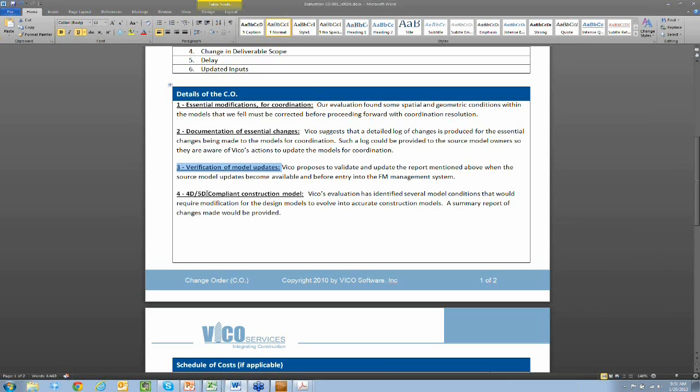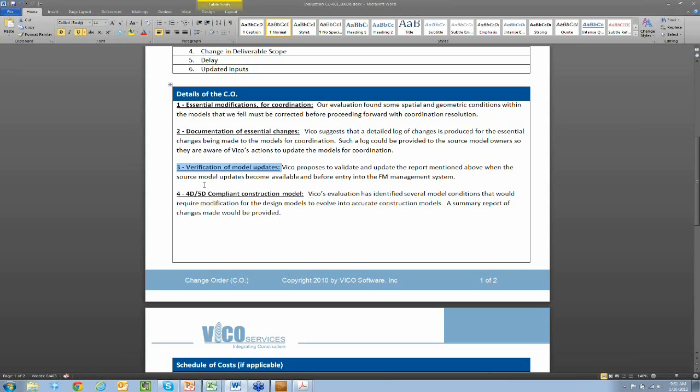The last option that you see in here is for 4D and 5D compliance. This has a lot to do with standard naming conventions and modeling techniques to make sure that you get the right quantities that you need out of these models. Not everything in 4D, 5D compliance relates to coordination. So we will work with you from the beginning to determine if you're going to leverage this coordinated model for estimating and scheduling. And if you are, we'll be able to help lead you to how to update it for that.